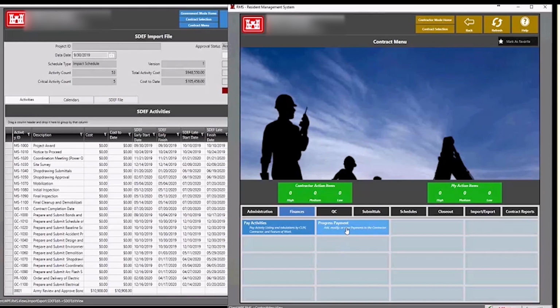Yeah, kind of. So I can go in and adjust it myself, so I don't have to have the RMS team assist me. I'm a project management specialist, scheduler, whatever you want to call it, so I can go ahead and adjust the activities on it, right? Correct. You can do that. We encourage you to go back to the scheduler and have them correct it until things import and are balanced. Even though you could manually do it within RMS, the next time you import their schedule, you'll have to do that all over again.